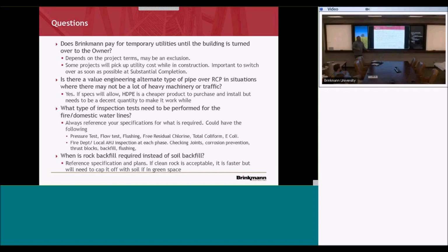So if we are carrying that, the project engineer, you communicate, your managers let you know, hey, we got the utilities, you've gone through your cost control, you kind of see what's going on. When you get towards the end of that project, you start figuring out how you get things transferred over. Sometimes it's as simple as calling them up and saying, hey, this needs to go into Midwest Regional Bank's name. Other times, they won't let you change it over.